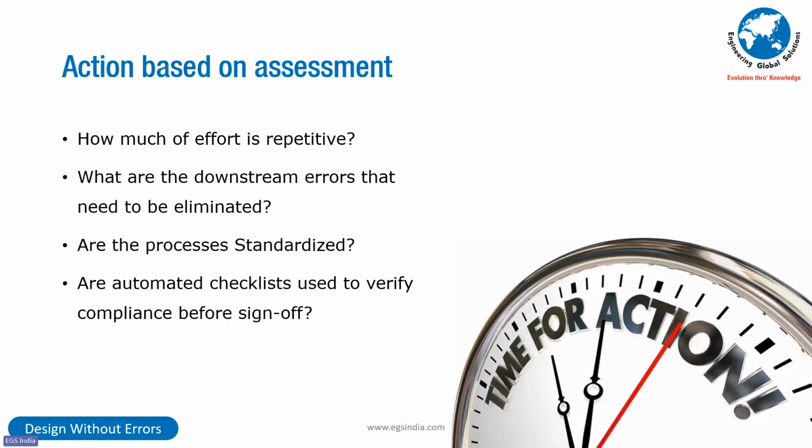There are endless questions which we need to keep adding upon, but these are significant that can impact the cost, time, and quality. As a result of which we need to address this if we have to look at design productivity. If a person releases a drawing, let us say within an hour, but it goes through 3 to 4 engineering change requests because of errors in considerations and output of the drawing over the next 3 weeks, and the tooling gets delayed, the supplier engagement gets delayed, then it is design productivity which is at an issue.